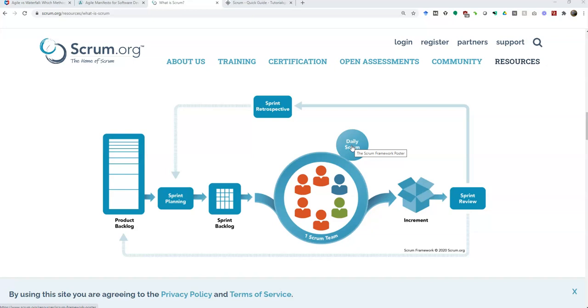But there's something called the Daily Scrum. And it has different names too. The Scrum meeting, the stand-up sometimes. I don't know if this is folk etymology or not, but stand-up to me means kind of propping something up. But they're saying it's because you're usually standing when you do it, because the whole idea is a Scrum meeting is fast. It's 15 minutes is the time limit traditionally, and I doubt that ever happens.